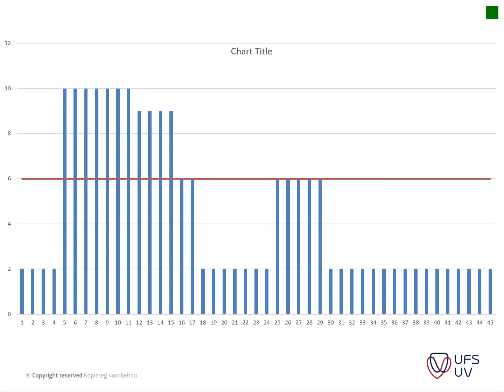Okay, now the example continues to indicate the maximum amount. So the problem with the contractor is that he only has 6 joiners available to work on this project. If the project completion date is not to be extended, the only solution to the problem is to level the labor demand within the program according to the number of joiners available. This means adjusting the work activities within the available float, but obviously not the critical ones, to reduce the peak labor demand situation. This is shown in figure 18.3.